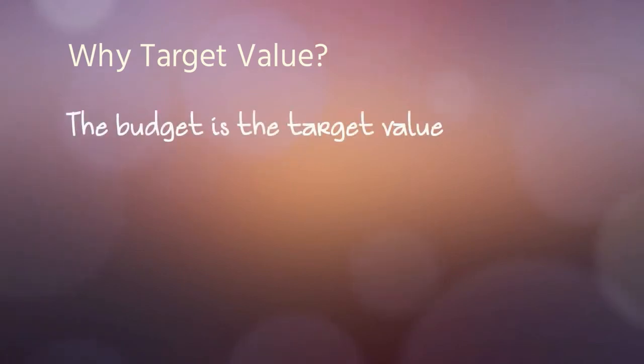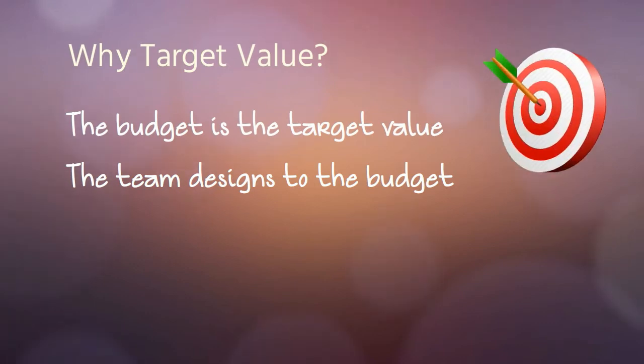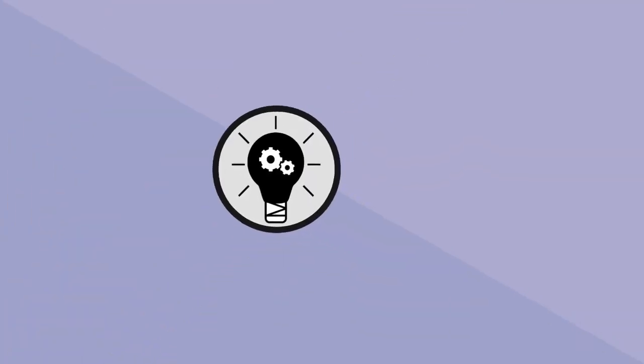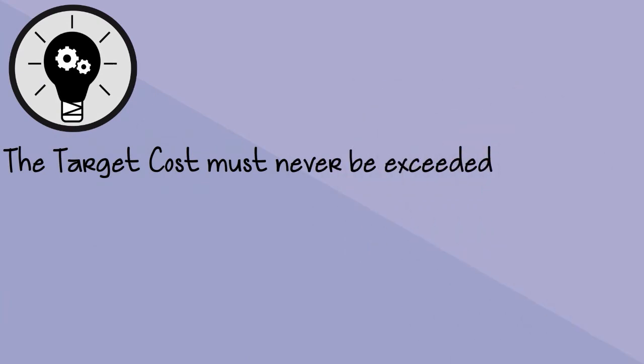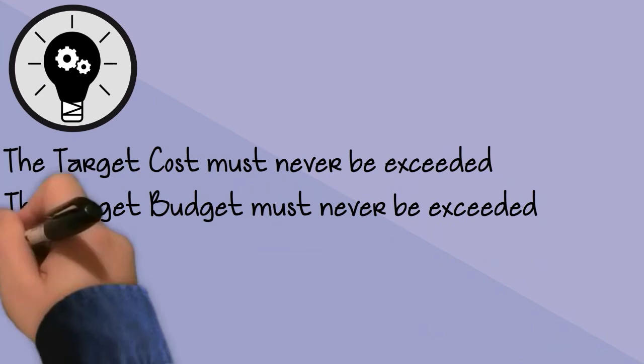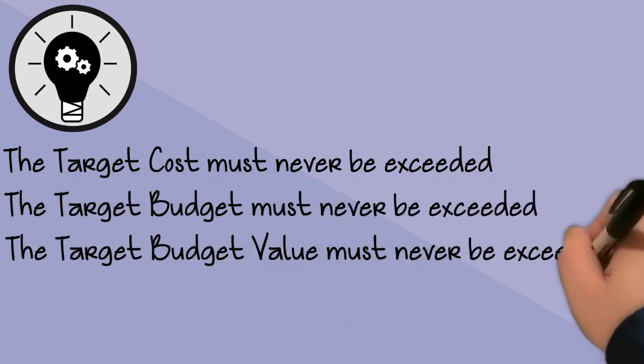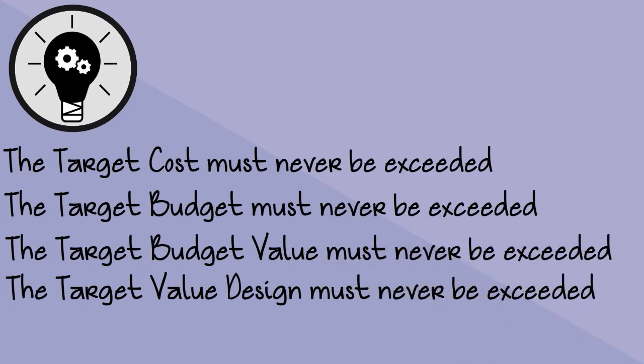But why Target Value? The Budget is the Target Value. The team designs to the Budget, instead of the conventional process of estimating the cost of the design and then redesigning to eliminate overruns. So remember, the Target Cost must never be exceeded.